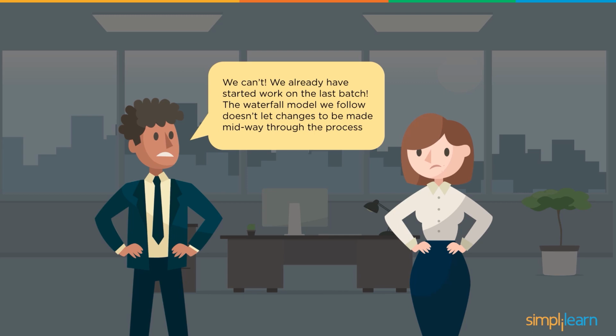The waterfall model allows us to make changes, but it doesn't allow us to make them quickly. Whenever there is a change, it requires a lot of effort. It requires changes in documentation. It asks for changes in various implementations which are already done and executed. A lot of effort is involved, which is time consuming, and it also involves more cost.